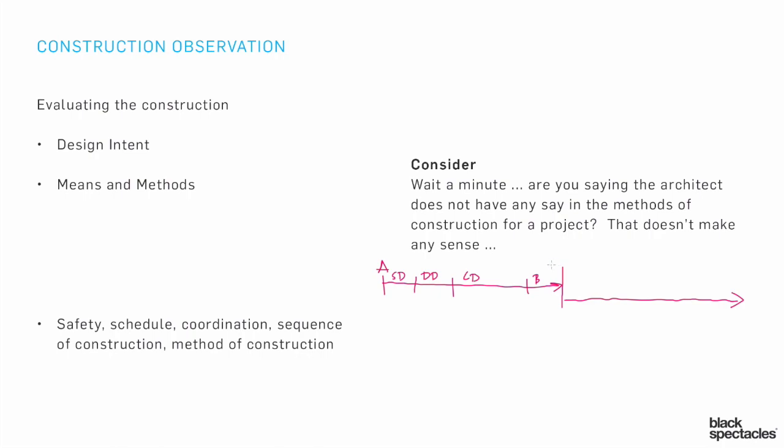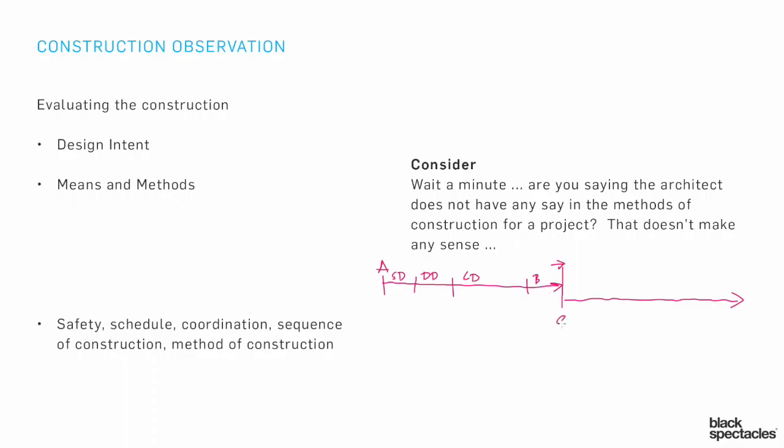Up until that moment, all of those issues about the materiality, the sequencing, all those means and methods issues — they're all still conceptual, all still on paper. There's no physicality to them. The architect is kind of in control at those stages, but there's also no general contractor, so there's nobody else that could be in control. At this point, we now have the GC, and this is the point where everything moves from the conceptual into the physical.